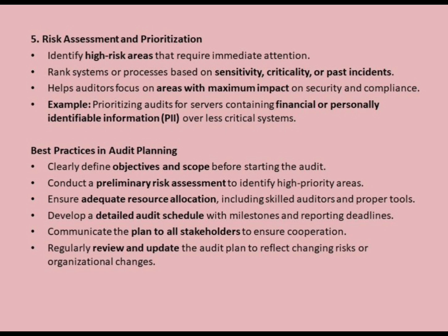Adequate resource allocation: assign skilled auditors, provide the right tools, and ensure personnel availability. Example: a network security specialist is assigned to check firewalls and IDS configurations. Develop detailed audit schedule, plan timelines, milestones, and reporting deadlines. Example, Day 1-3 for server review, Day 4-6 for application logs, and Day 7 for interviews.